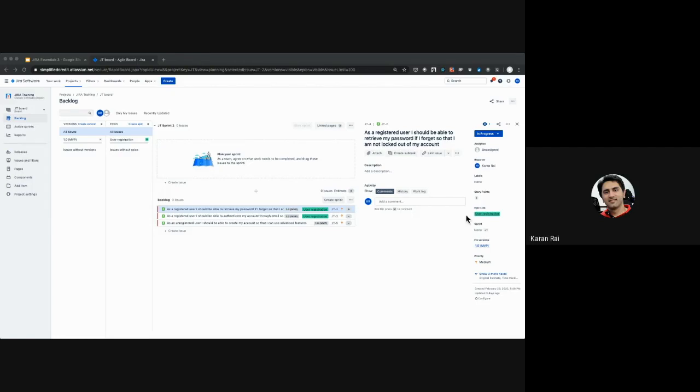So we can share. My thought was around 3, but then I didn't consider the aspects of security related to the password, and hence I would probably revise my story points to 5. Now this is an example of how a discussion evolves in an estimation exercise. Cedric provided his estimate, and then he provided his reasons for his estimation. He provided certain points, and then people who are estimating differently hear those points, and then they discuss this and align on a commonly shared story point that they believe is a baseline that they can set, right?